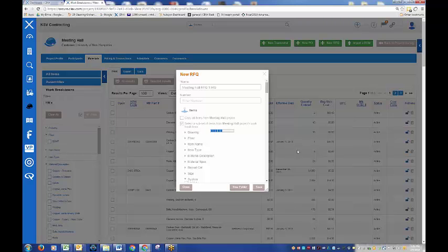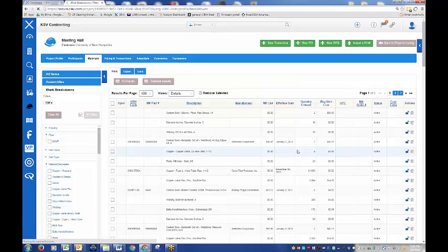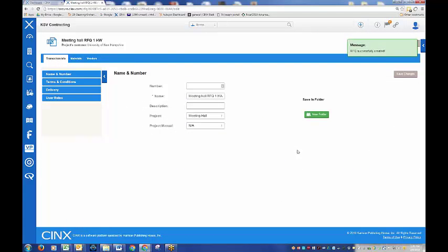They'll respond, and you can use a lot of the capabilities in CINX. One is this concept of quote compare. So you can actually send out to 4 or 5 different suppliers, and you can use the capability in CINX to compare all the quotes. And you know how if you send out a large quote to 4 different suppliers and you get it back and they've realigned, they've changed it around everything else. You got to change around everything. Well, that will not take place with this, because it's going to be aligned around the cross-referencing of both the naming of the item and the HPH code.